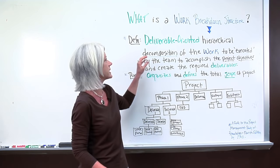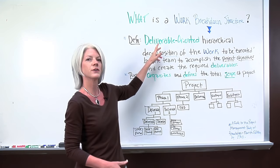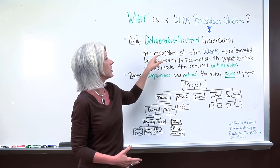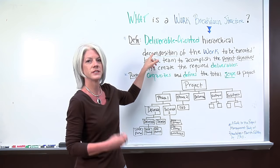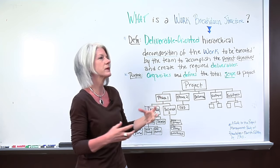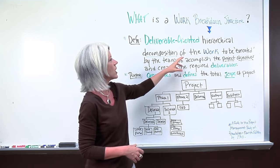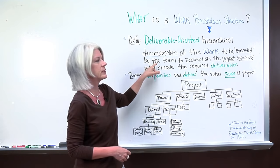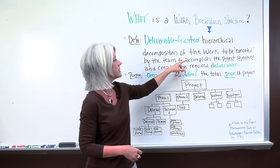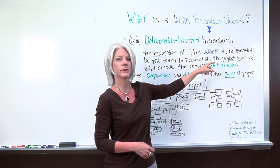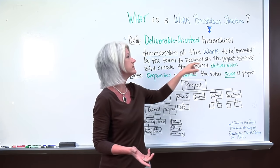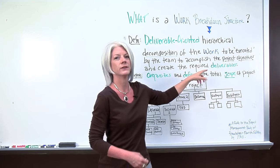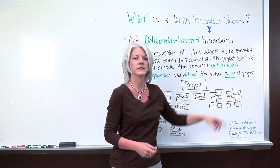A work breakdown structure is a deliverable-oriented hierarchical decomposition — so we're breaking something apart — of the work to be executed by the team to accomplish the project objectives and create the required deliverables.